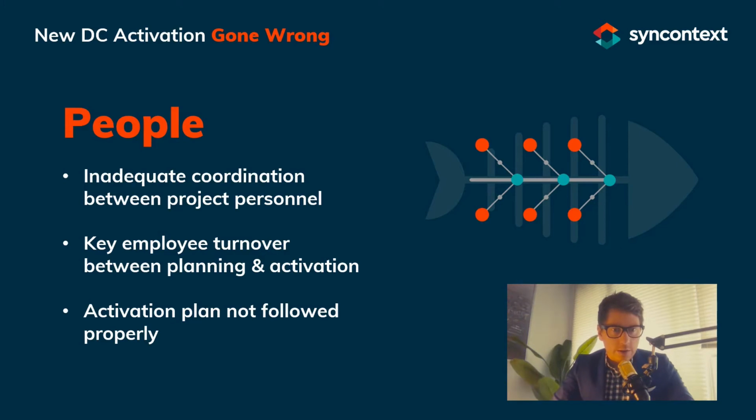You've no doubt heard the common saying that most car accidents happen close to home. Well, applied to this situation, it also has some truth. The reality is that we do tend to let our guard down the closer we get to our comfort zone, no matter how experienced our operators are or how well the project has gone to that point. Do not ignore the importance of a well-planned and meticulous activation plan, especially if systems and automation are involved. The more complex a system or layout, the higher the chance you will encounter issues during the implementation, so plan accordingly.